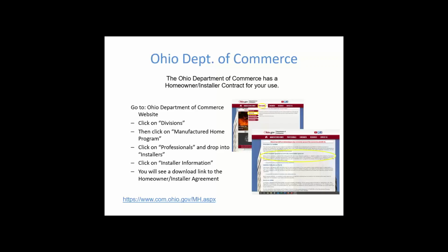In fact, all of your communications that you've had before you enter into the contract should be included within the contract. Under contract law, anything that is said before the contract is created and signed is null and void. It doesn't matter what was said. All that matters is what's in writing and signed by the two parties. So make sure anything that you've agreed to or that the homeowner is expecting is put into writing, and be aware that anything that's not could be held against you, but that would be really difficult as far as parole evidence, which I'm not going to go into.